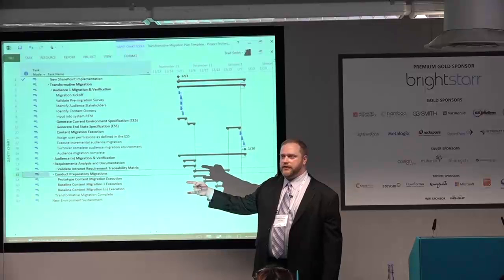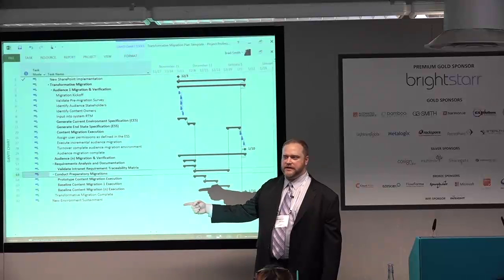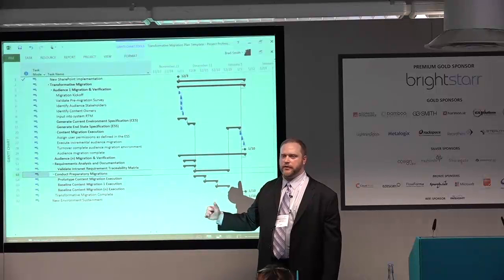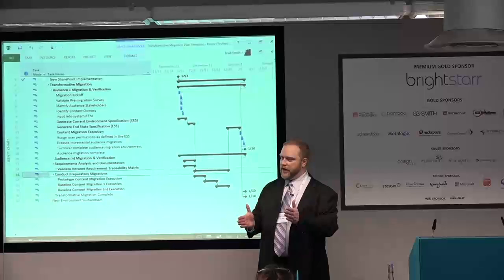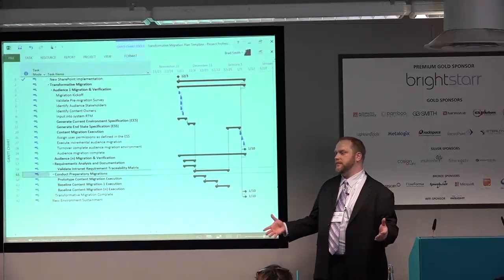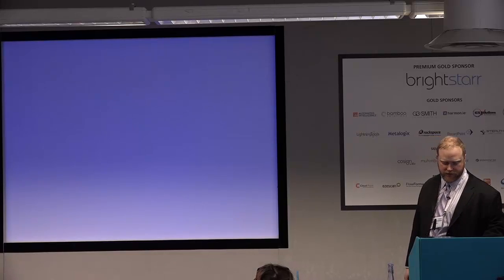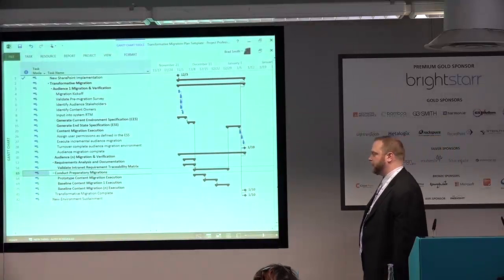Resource loading here is going to have a much slower impact. You're not going to be able to parallelize these tasks. These are things that must happen in this order. You can shrink them by adding resources, but there is diminishing returns with any technical project where, eventually, no matter how many people you throw at it, it's still going to go that long.